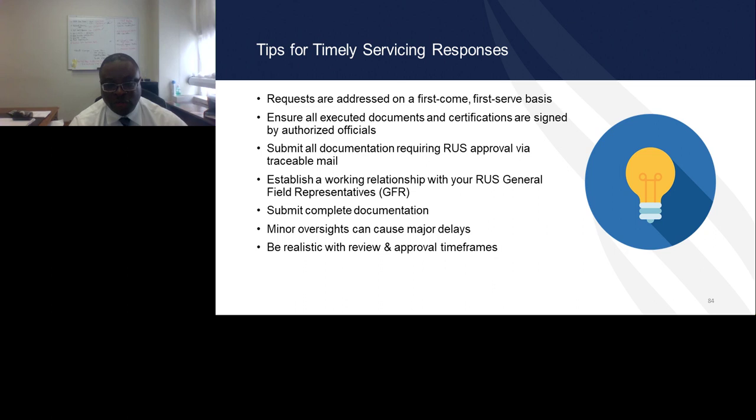Minor oversights can cause major delays. This is very true. We have received in the past contracts that were signed by the awardee and not the contractor. In some cases, we have contracts that were signed by the contractor and the awardee signature was missing.